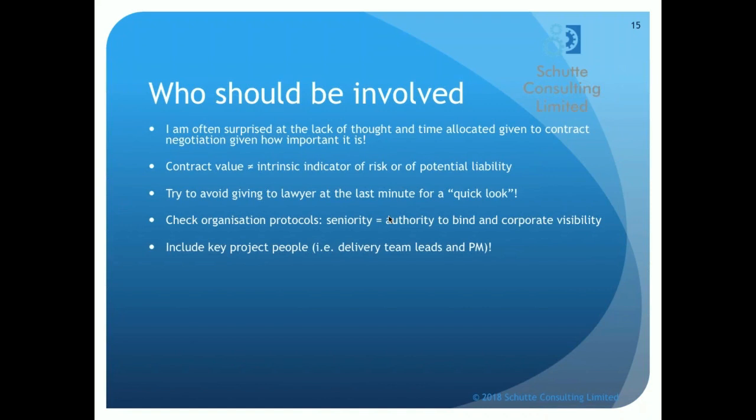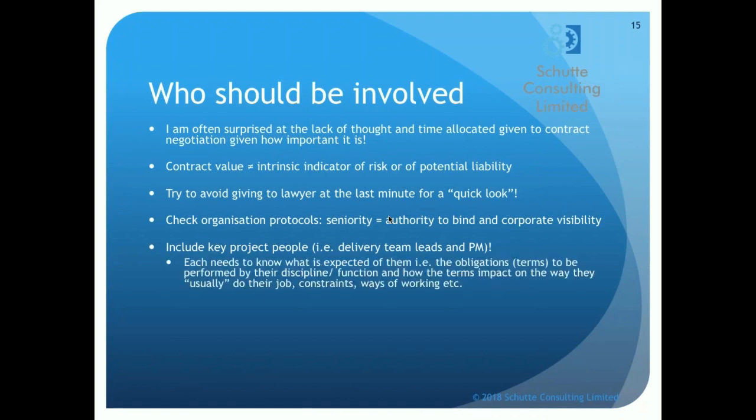Now, here is my assertion for project managers to get involved in contracts. I want you to include the key project people that are going to be in your team, okay? That's you and your delivery team leads. Why? Because everybody needs to know what is expected of them. It's very simple, really. There are certain obligations, i.e. terms of contract, which are going to have to be performed by different disciplines and functions within the organisation.